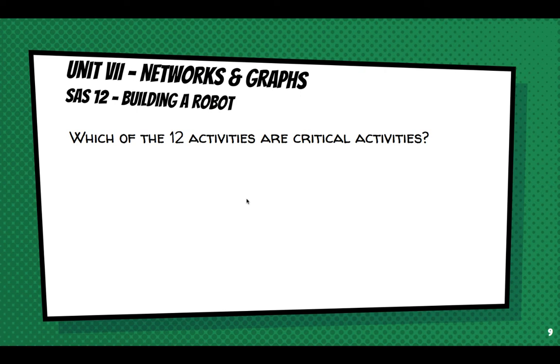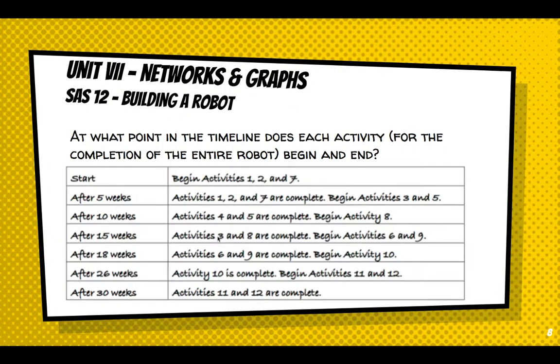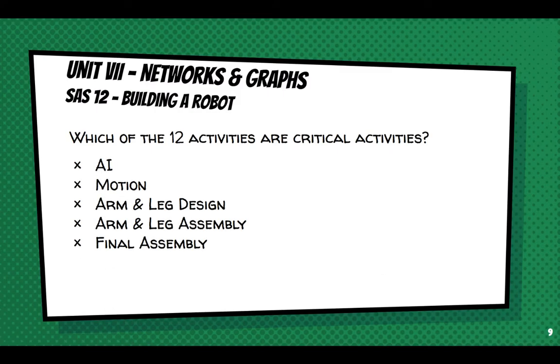First of all, we need to define what a critical activity is. A critical activity is an activity, if delayed, would possibly affect the minimum time of completion. So what were the activities on the minimum time of completion pathway? Let's go back and look. We said AI, M, ALD, ALA, and FA. The minimum time of completion lies on that pathway. So all five of these activities are considered critical activities. Yep. There you go. There's the five activities.